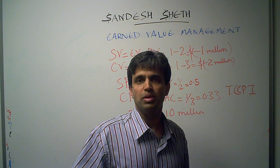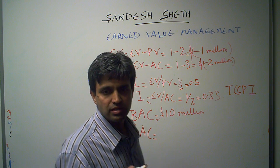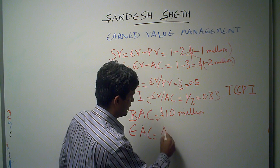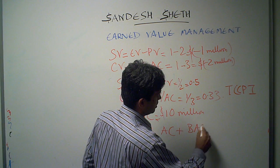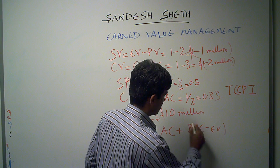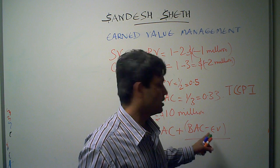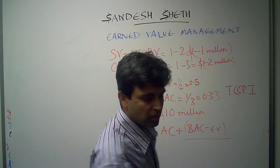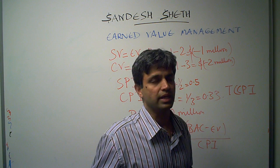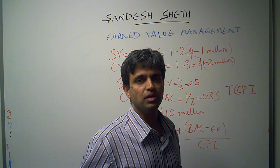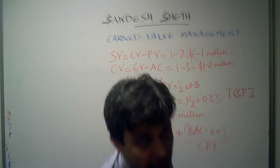The formula normally available in books and online is: EAC equals actual cost plus budget at completion minus earned value, divided by the cost performance index. This is a very simple formula and you can look at it directly.